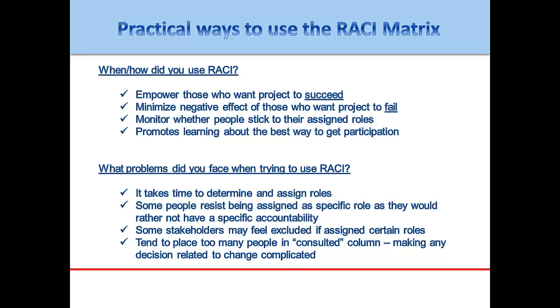Finally, I've seen this in practice, that there's a tendency to place too many people in the C or consulted column. Doing that can make any decision process related to change too complicated, and it can really slow things down.